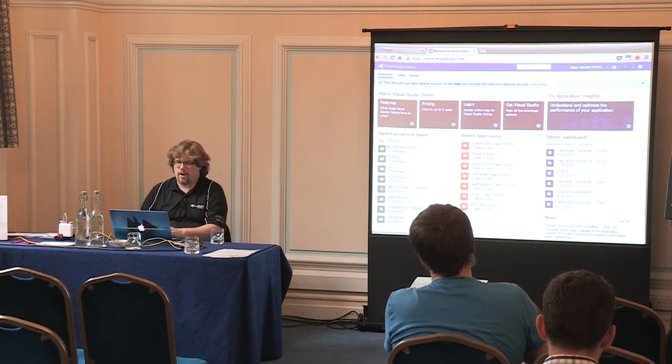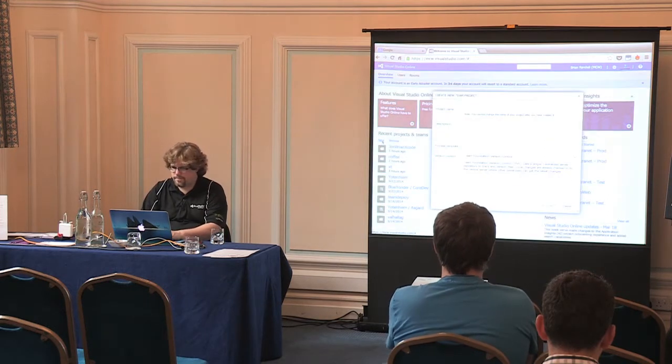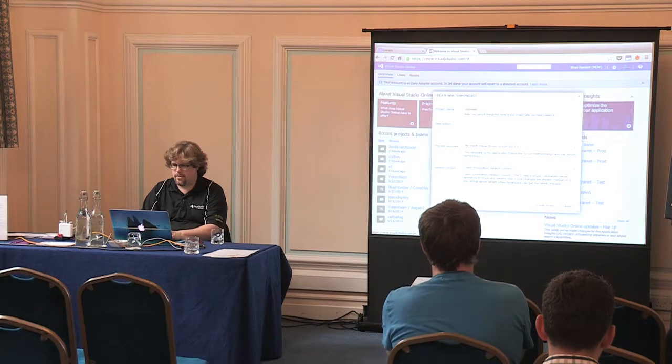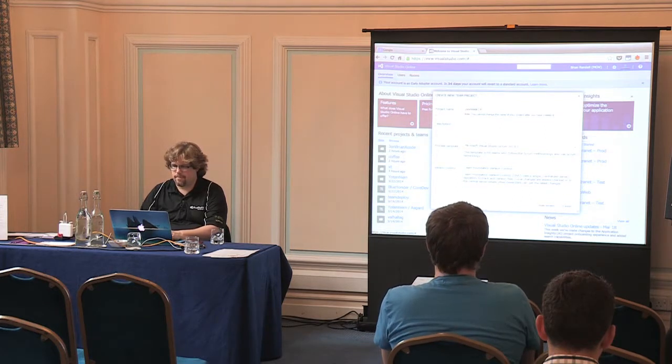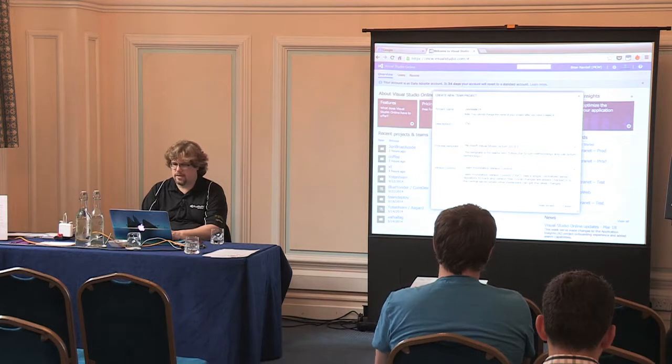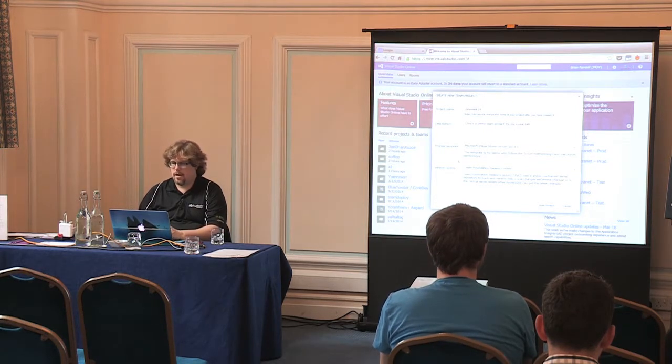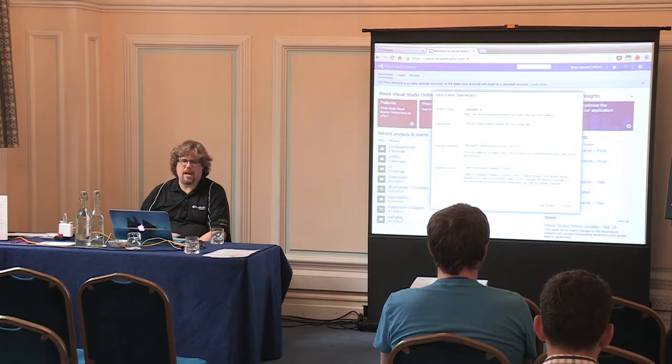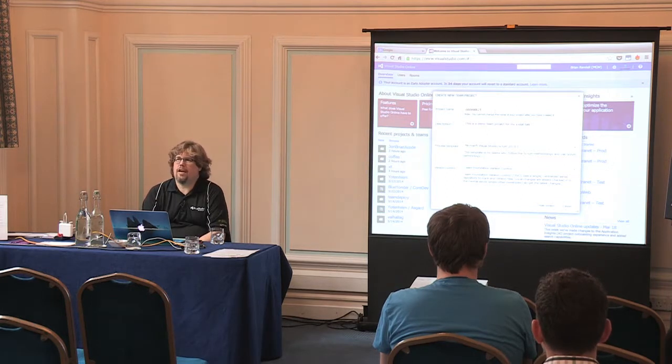In either case, I'm going to go through and create a new team project. We'll call this DevWeek 14, or just W14. Now, here come a couple things you need to be aware of. First of all, the name. Project names cannot be changed, so pick something you like. Moving your data from an existing team project to another one is possible, but depending upon how you want to move things, for example, do you want to move all your history also? It can be non-trivial at best. So be careful which names you use.